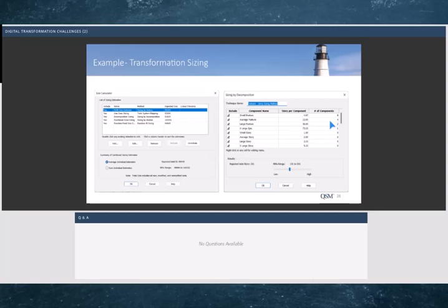If you look at the center column, there's that gearing factor I talked about, the way that we can bring everybody on the same page. Because someone in the company or someone in the team is thinking more in terms of stories, but I'm thinking in terms of features. So what we're doing here is we're saying, okay, I've got 8 features, and each small feature is equivalent to 4.6 stories. I've got 4 average features. Each of the average features is equivalent to 12 stories. So you can see the average features have more complexity, the large ones even more. Each large feature is equivalent to 36 stories, but I've only got 2 of those. So you see what we're doing? We're leveraging the scope, and we're bringing consistency to the way we define it, so that each team, which is magnified in a transformation process, can be on the same page.